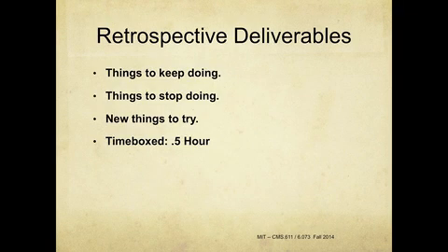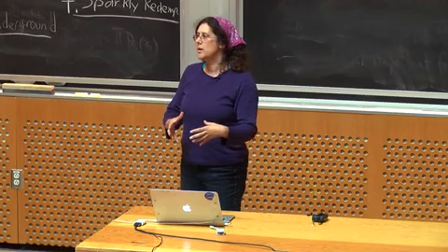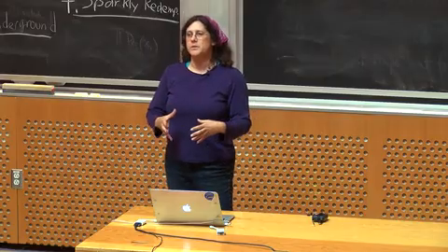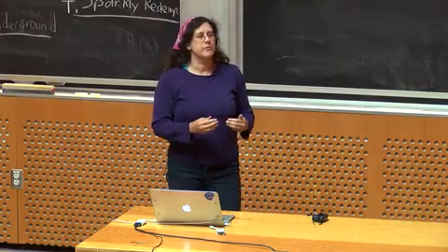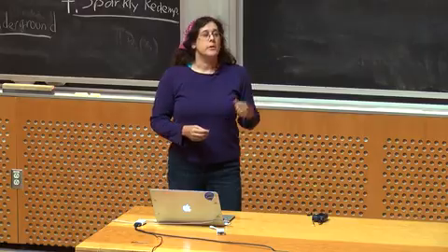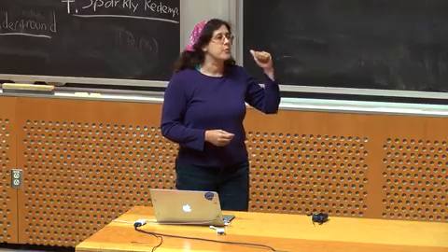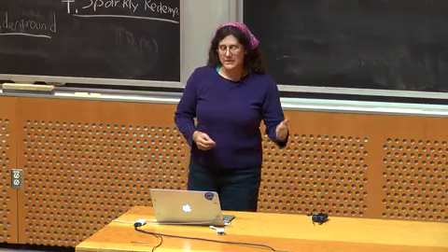The other end of the sprint meetings is the retrospective, which is not the same as the sprint review. A lot of teams try to smash a sprint review meeting and a retrospective meeting into the same one, and they have very different purposes. The sprint review meeting is all about reviewing your product. The retrospective is about reviewing your process. It's about talking about the team.